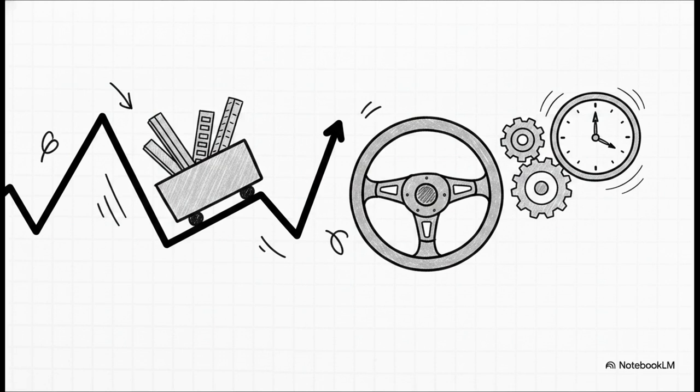For example, if a client issues multiple change orders, those change orders are the driver that forces you to increase work hours, which in turn spikes your variable labor costs. Understanding this relationship helps you anticipate financial turbulence way before it hits.